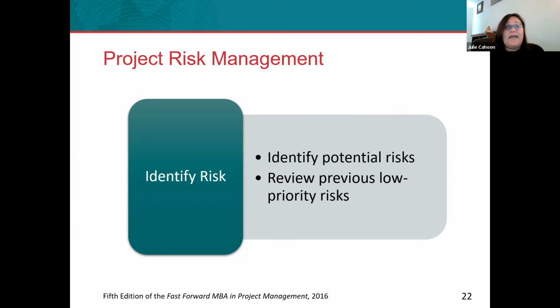A few ways to identify risk include brainstorming with your team during a check-in call. You can make this an agenda item on a once a month meeting topic, or just integrate it within your workflow, within your check-ins, whether that's monthly or quarterly, to just really talk about what your staff see as potential risks. And another tool is something called a risk register.